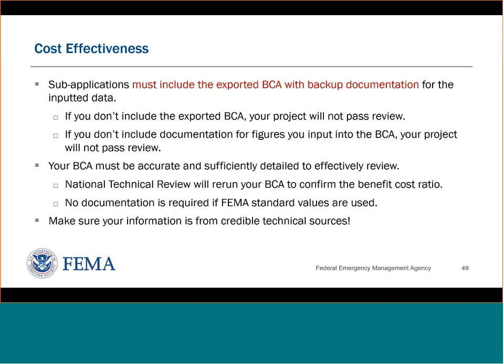There's a project useful life for every project type identified in the BCA tool, in their help menu. There's a table which shows, I don't know, at least a couple dozen different project types and categories. It has an identified useful life that you need no documentation for, or you can revise that with documentation.